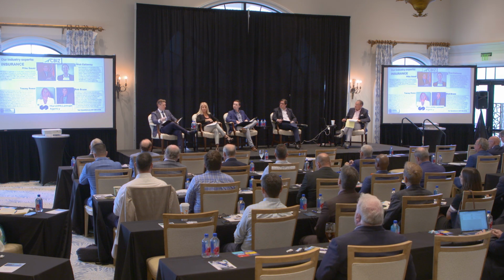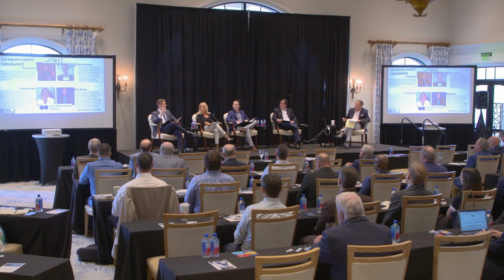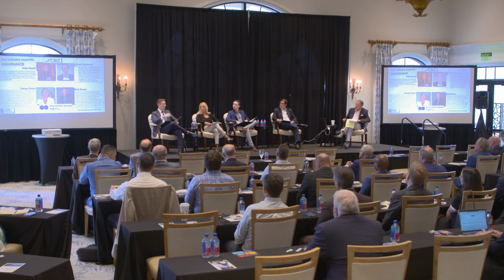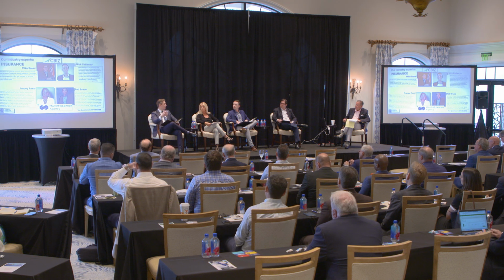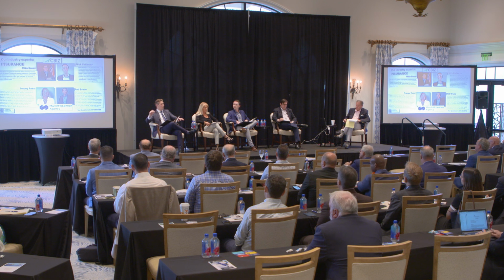I'll throw in one thing there, and you made me think of it, Mike, when you said benchmarking, but there's a process of wind modeling, and I'm not going to go into the weeds of that, but real-time example, a client was going to build a large portion of buildings, and we actually wind modeled if they were going to use lumber against steel and what the rates were going to look like, what the carriers would view that at. And it was a great tool to sit with the client and show them what the difference is. And to Nick's point, what it costs to build with lumber, what it costs to build with steel, but how is that going to look to the carriers, not only from a builder's risk standpoint, but from a permanent coverage standpoint.